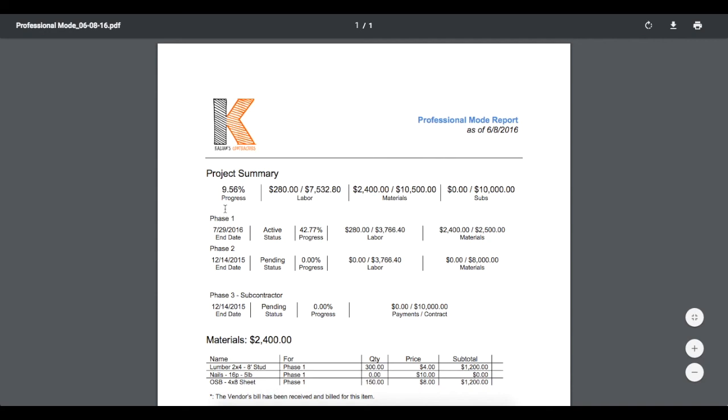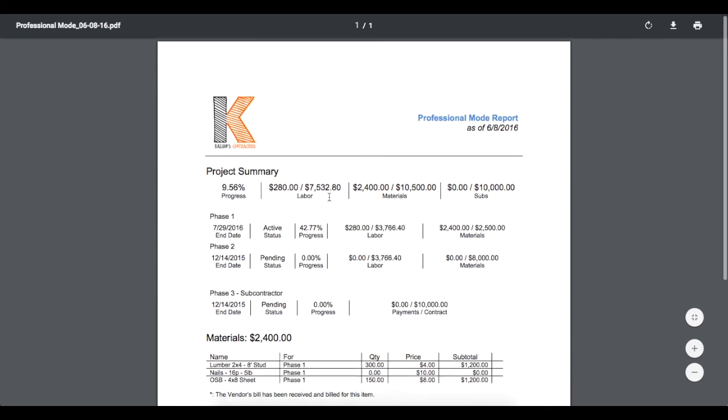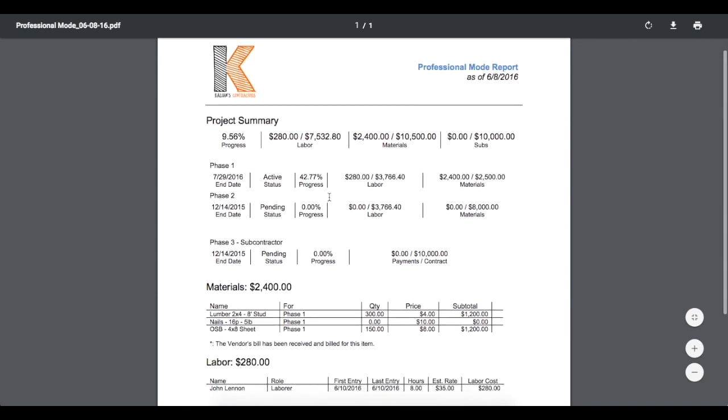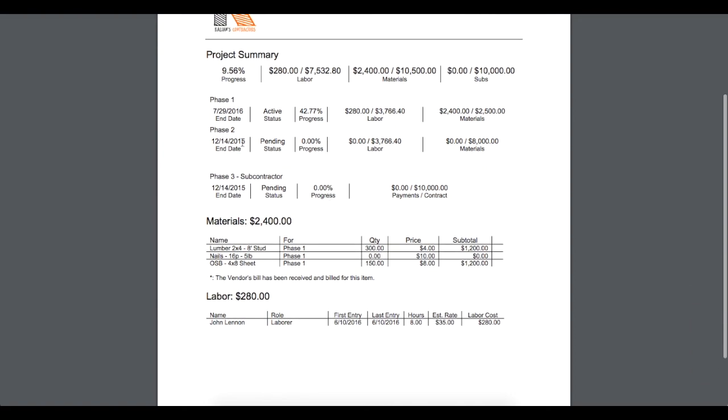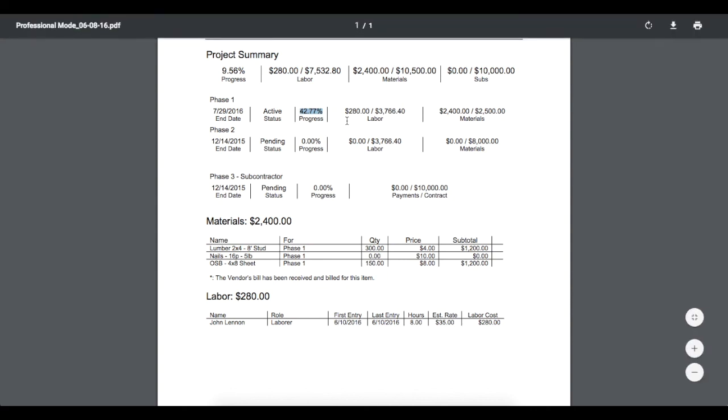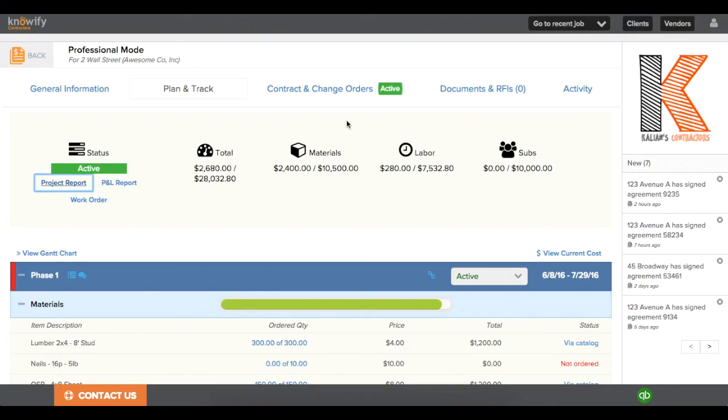Our Professional mode jobs will also give us a slightly different project report. You'll see that we get a percentage of progress complete on the job based off of our actual cost versus how much we initially estimated. This way, if you're using progress billing, you have a percentage for you to invoice off of. And since you can see the percentages at a phase level and the line items were made off of phases, the process will be automated for you much more easily.